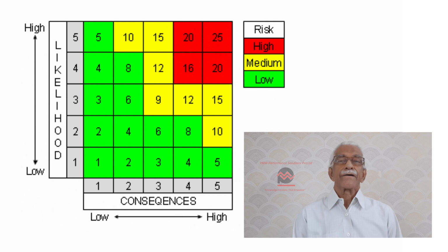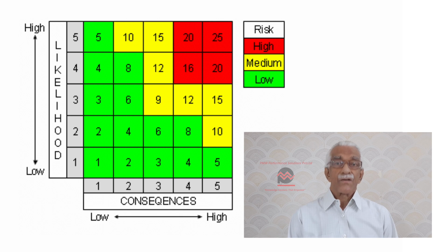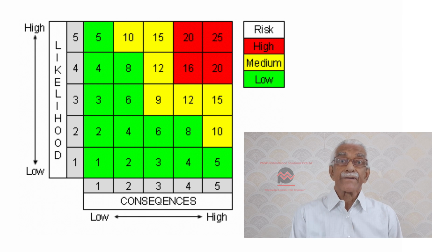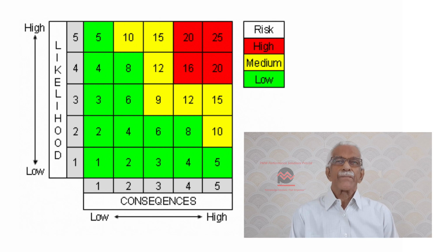From this, we also have to define the probability and impact matrix. Now, for a person who's risk averse, for example, a probability of 7 on the matrix may be very high, but for a risk tolerant person, 7 may not be that high a figure. He or she is willing to accept a higher level of risk.